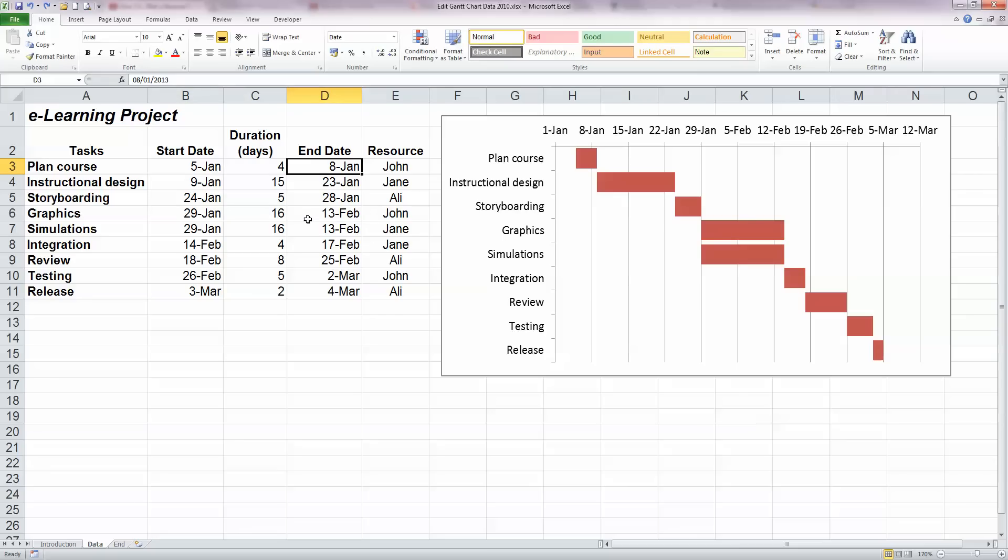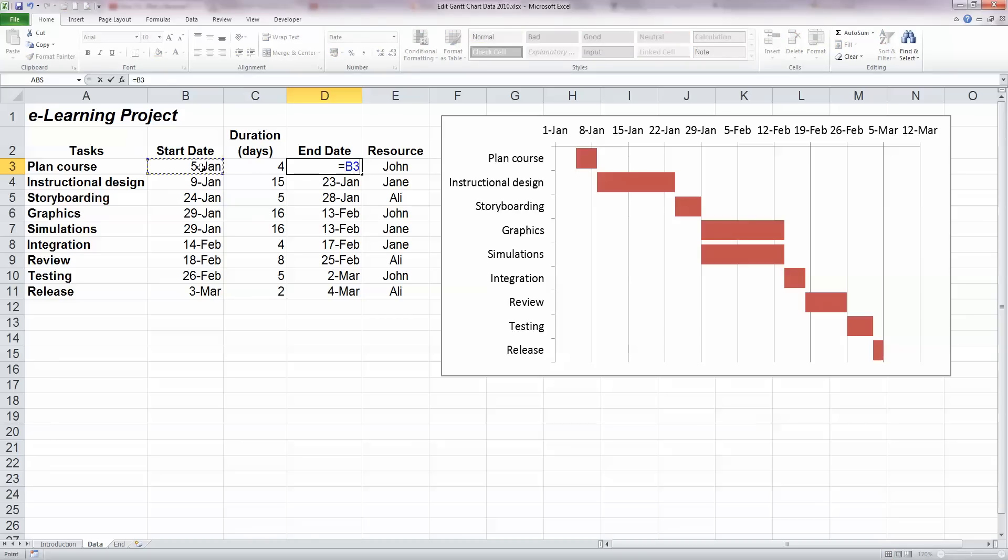And to do this, Excel allows us to add numbers to dates and indeed to add dates to each other. So what I'd like to be able to do is add the duration to the start date. So let's go ahead and do that. So I'm just going to put in a formula here in the end date cell, overwrite what's in there, equals the 5th of January, which is in cell B3, plus the duration, which is 4. That's in cell C3 and press enter.